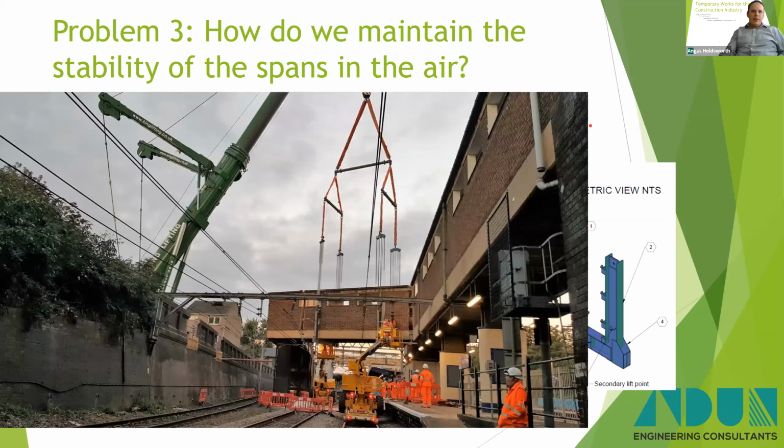And there it is in place. So we got the 500-ton crane, 4-point lift with chain hoists to provide any final adjustment to balance the load out.